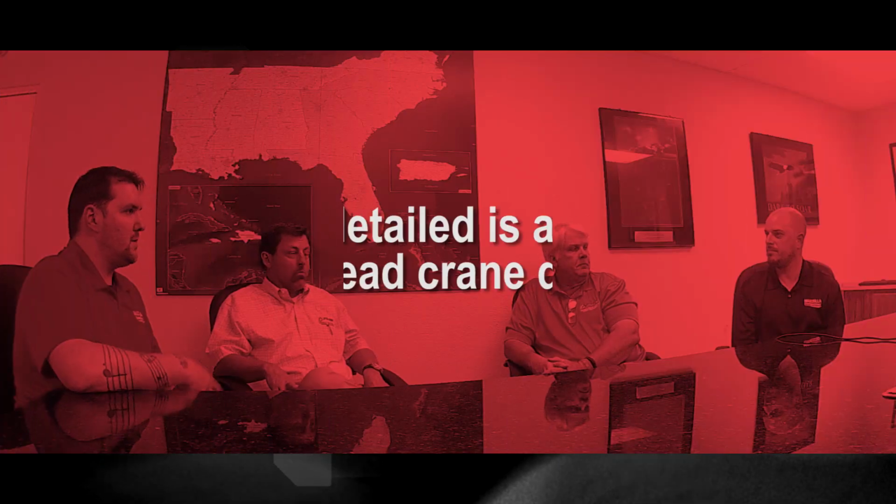Well, and let's not forget too, you've got to get the crane to the facility, so there's freight costs involved too. And is that something that's always included on quotes? We typically do, just as a standard, but there's a lot of people that don't, and it's overlooked sometimes when comparing quotes. So we kind of have to direct them, say, we have freight included, so they know that someone else may not include freight, because depending upon where it's coming from, or how large the crane is, it can be a significant cost.